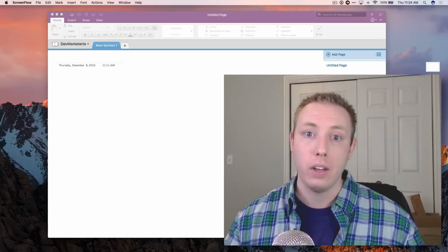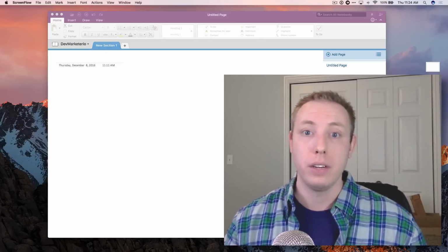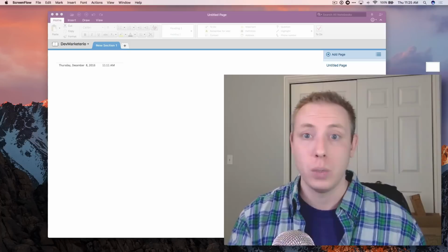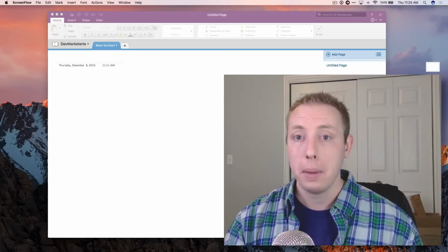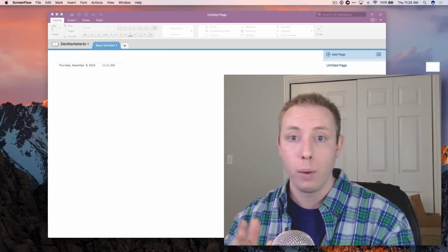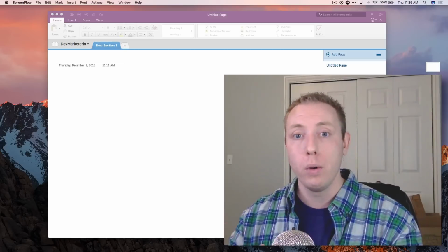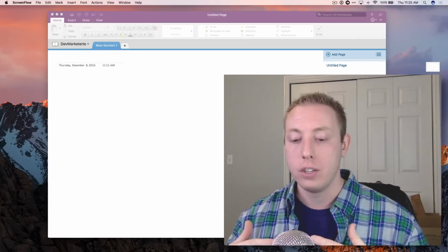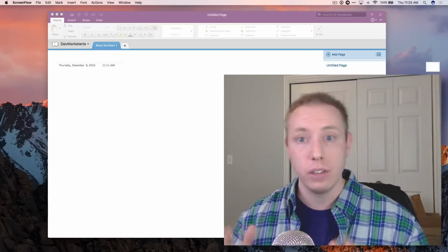And so I always tell them that I'm going to price at a fixed hourly fee during the discovery phase. And I'll bill them usually on a bi-weekly basis. Every 2 weeks, I'll bill them for however long the discovery process takes. But then we'll actually come together with a contract at the end of the discovery phase before we move into the design, phase 2, 3, 4, and 5. Before we move on, I usually have the contract then. So I'm basically working on just an hourly basis as needed during the discovery phase.